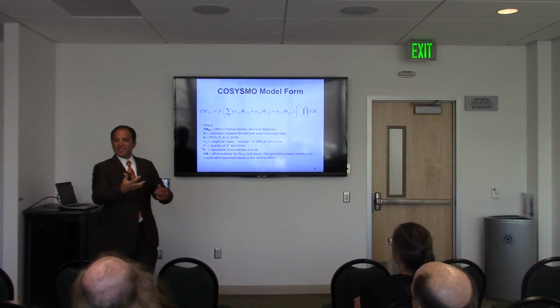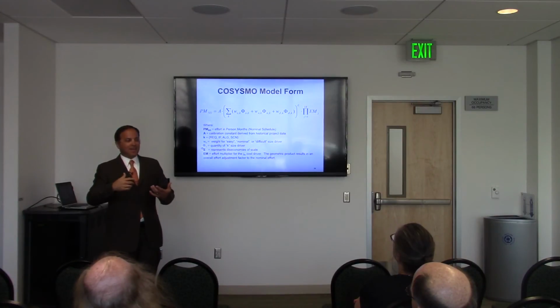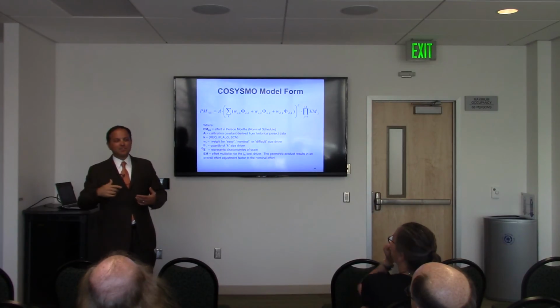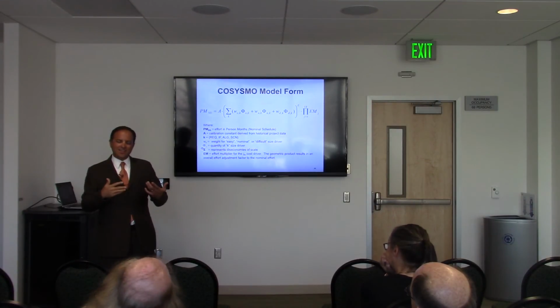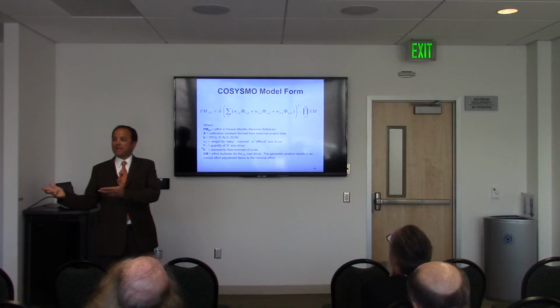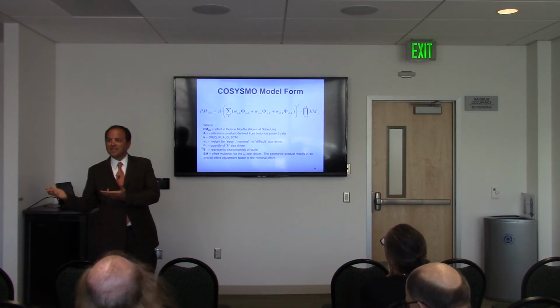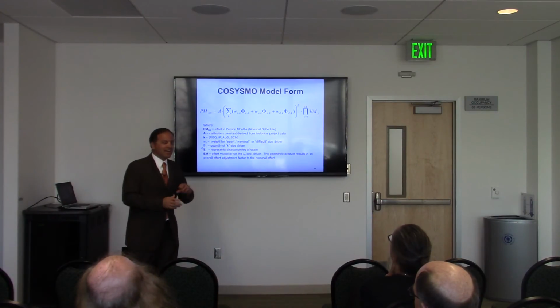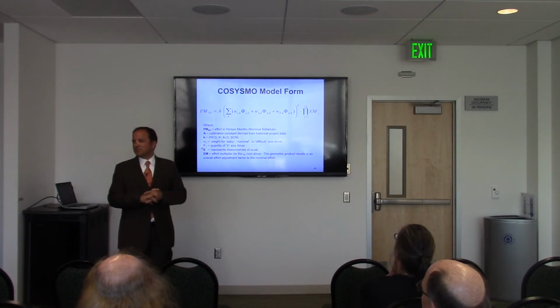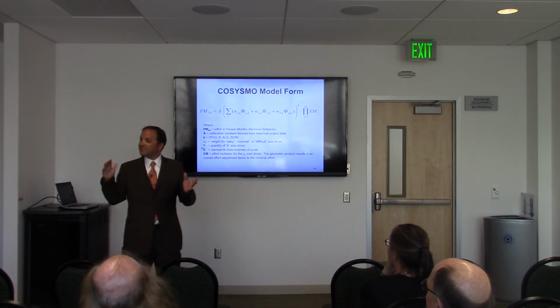They said, okay, let's use that as a baseline. But the Mars rovers are more expensive because they're more complex. The mission is different, right? So at least when you don't have any data, there's actually some estimation by analogy that you can do, that either you've done or somebody else has done. Maybe your competitor has done it, right? So, to a limited extent, you can use historical data, but it's not going to answer the entire question